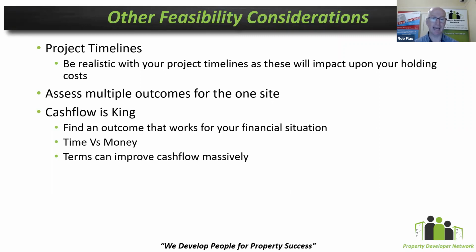Cash flow is king, okay? So it doesn't matter what the profit says at the end of the deal if you can't actually fund the deal as you go. So you're going to have a whole bunch of costs that you're going to have to cash flow as you go. So you're going to have to pay all of your consultants, pay all the application fees, all of that sort of thing as you go, pay for the construction. That's money that leaves your pocket through the entire process. If you don't understand that cash flow element of things, you may find that you may never be able to get to that finished product.